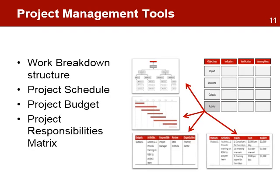The use of project management tools helps manage implementation of the project intervention. These management tools are: the work breakdown structure (WBS), which describes all the project activities; the project schedule with the estimates for the completion of each activity; the budget with the cost estimates for each activity; and the responsibilities chart with identification of the people responsible for doing the project work. These tools use information from the log frame activity level.